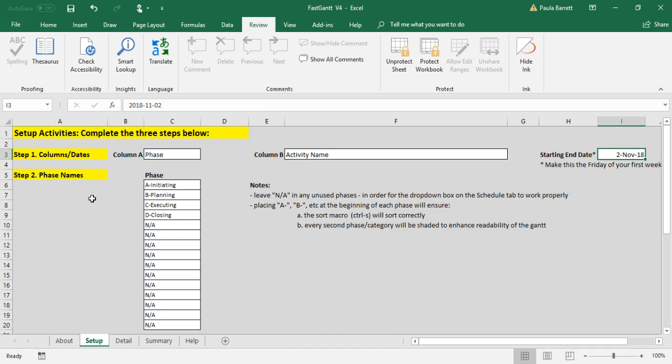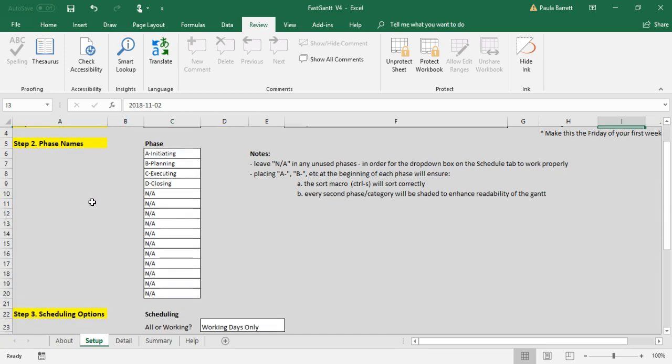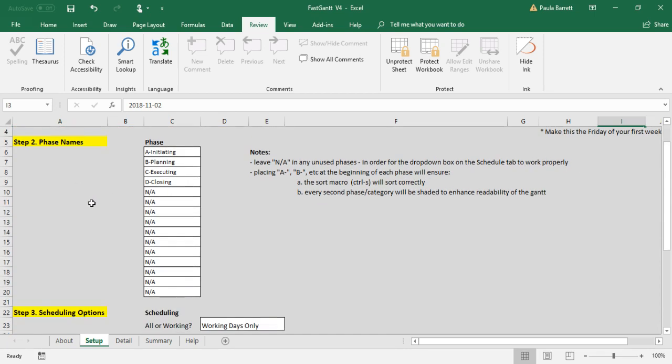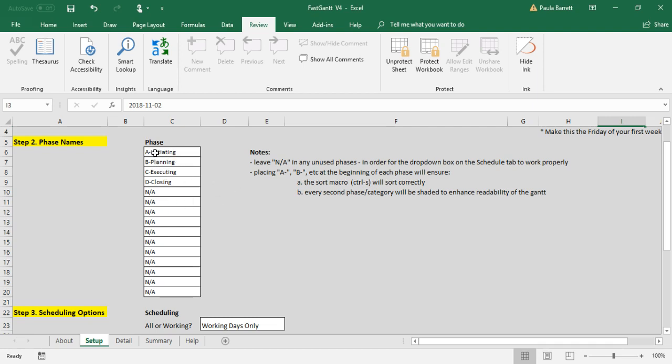Next, we go on to step two, which is the phase names. It's good practice to separate your project and to organize it into phases. The default is the following four phases: initiating, planning, executing, closing. Though you can name them whatever you like and even change the title of that column to be something other than phase. You'll notice that they start with A dash, B dash, C dash, and so on. There's good reason for doing that.